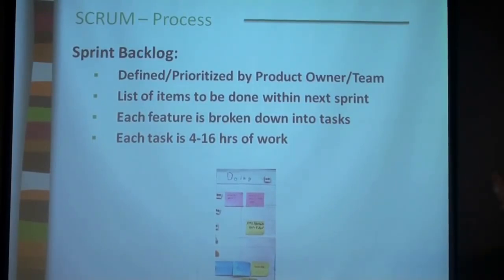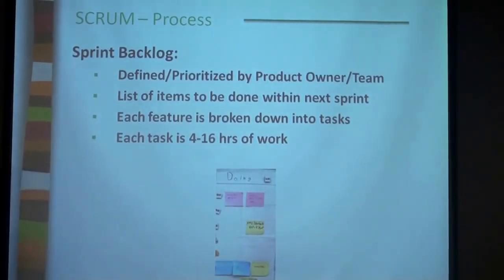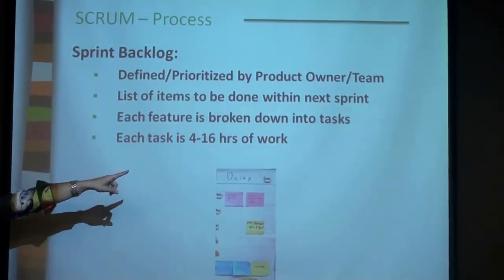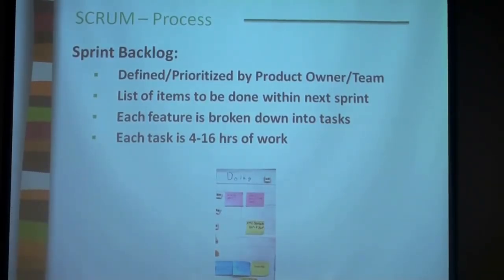Now, you may have the product backlog outlined right there on the wall. Out of that set of features, you need to pick something for the sprint. This is what we just did with the house painting project. So the same would be done with the product backlog. I never counted my post-its, by the way. But anyway, out of all these post-its, if we are to do the first sprint, we would pick the first few which have the highest priority, right? And we would say, okay, we want this to go into our first sprint. Because this list is already prioritized, we can make our life easier and just count.